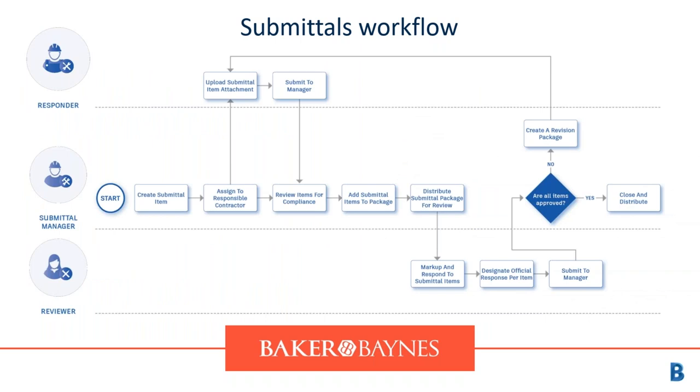So to give you an idea of the submittals workflow, your submittal manager will create your submittal item and assign that to the responsible contractor. The responsible contractor, main contractor, general contractor typically will submit that to the manager and review for compliance. That will then be created in a submittal package and distributed for review.